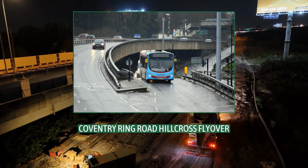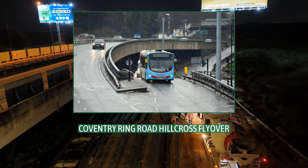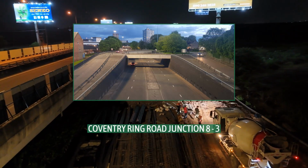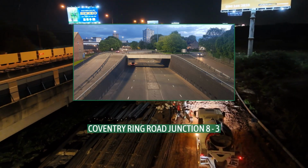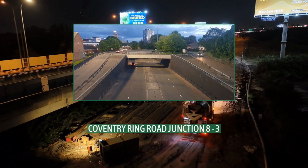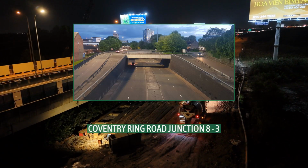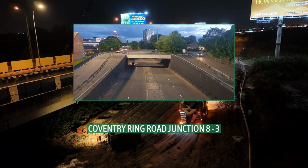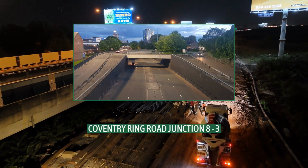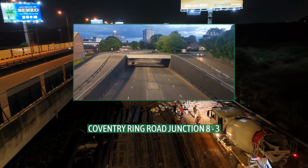This extended an existing culvert, which had been built during the 1950s and 1960s, taking the river underground for most of its route through the city centre. Steel prices had increased during the construction of Stages 3 and 4, so the council decided to use pre-stressed concrete supports rather than steel. They programmed a Leo III computer to assist with predicting the structural load on the roadway. Stage 5 was the longest to date with a length of 1,200 yards, of which 950 yards were elevated. It was also the most expensive to date, with an eventual cost of £4.6 million including land purchases.